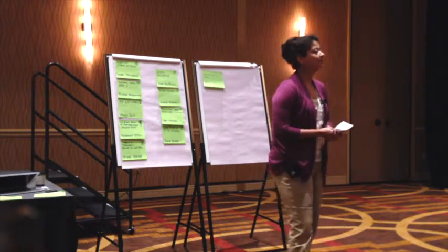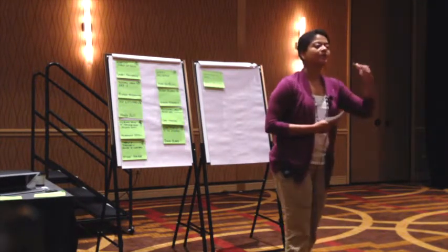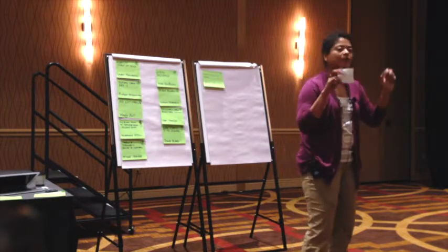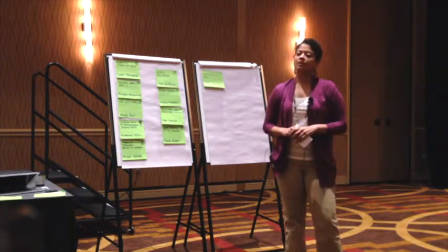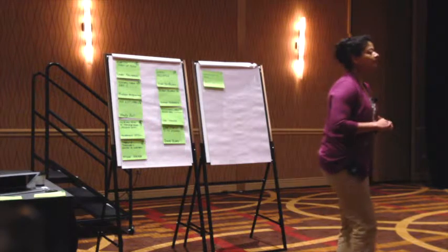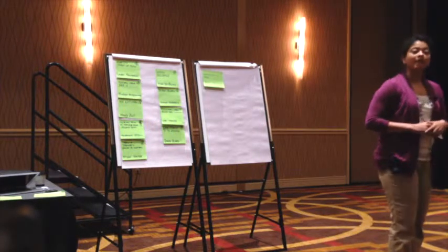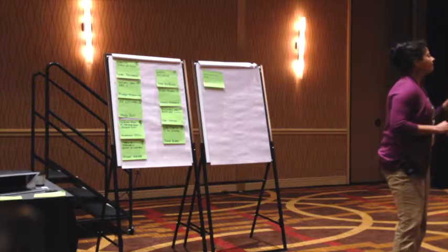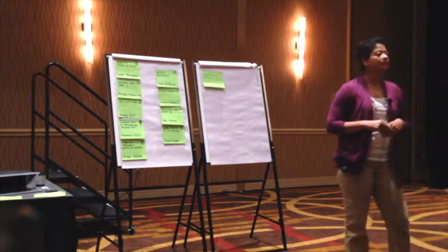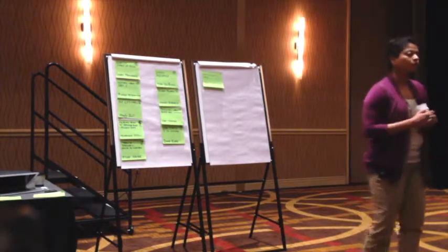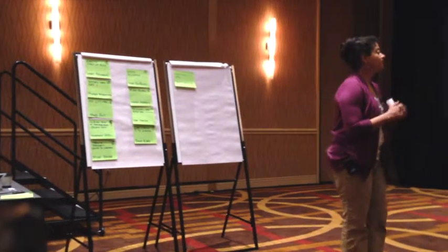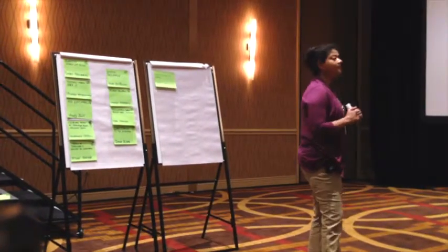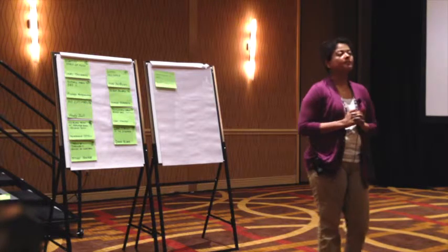Oftentimes, teams will come up with a list of tasks for the how section. What if all the tasks that the teams are creating are testable tasks? Not a development task, not a testing task, it's encompassing both. We have tried it, we have struggled, it's not easy, it's a little bit tricky, but we were able to do it.